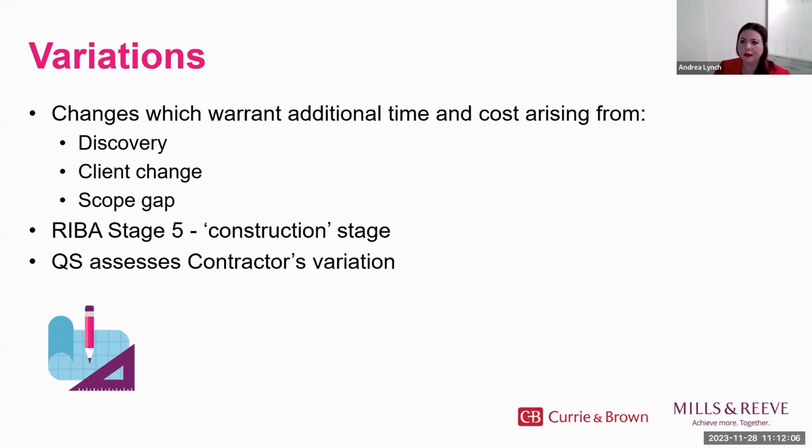Thank you. Is there a standard procedure when assessing variations, or again, is it just a case-by-case analysis? Again, this is a fairly standard procedure. During RIBA stage 5, it is the role of the contractor's QS to cost variations, and then it's my role to validate that cost. Typically, we start from first principles, i.e. building up a cost using component parts, including labour, materials, equipment, and OH&P.